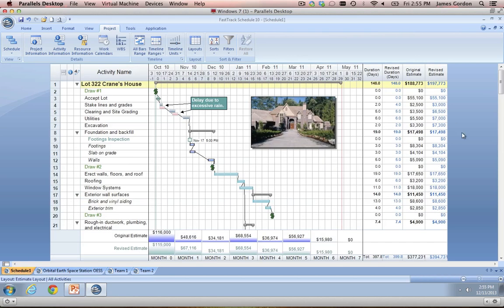Flipping back to our original Multiple Homes schedule and moving on from the Gantt chart — to the right of the Gantt chart you'll see the beginnings of some of our data columns. In FastTrack you're going to have a lot of pre-built information columns that most project managers are going to use, things like duration in days, revised duration in days, your original estimate and revised estimate columns. We'll also have a long list of columns you can choose from to insert in your schedule. FastTrack also has a lot of unspecified text, number, and calculation columns, so if you have a specific type of information you want to track, you can use one of those columns to format for your specific needs. The last thing I want to go over in the schedule view for now are summary graphs, which are placed at the bottom of your Gantt chart and will take the data from your information columns and put them in either a bar or line graph format.